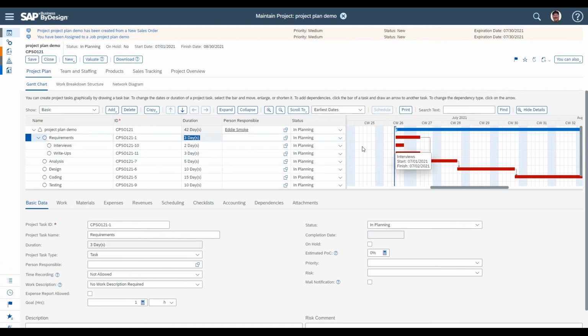That again comes down to, we'll just save this here, we'll see the overall duration of the summary task itself is 3 days. Because I haven't defined any dependencies or any constraint start dates on those two subtasks, it's understanding that so far these two things could be done in parallel, and therefore the overall duration of the requirements is 3 days. So following the same kind of dependencies we've already covered, you could further define that and get this to span out into 5 days if it's true that these should happen in sequence, not in parallel.